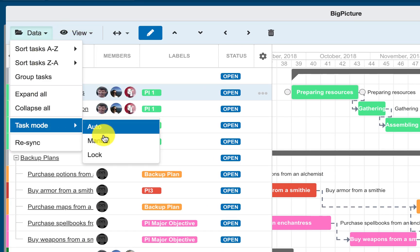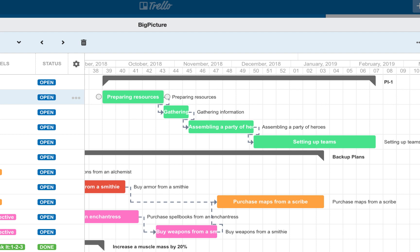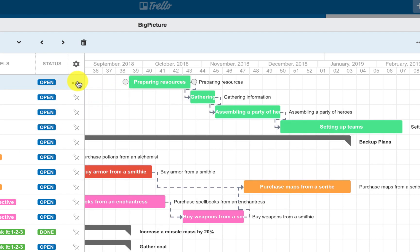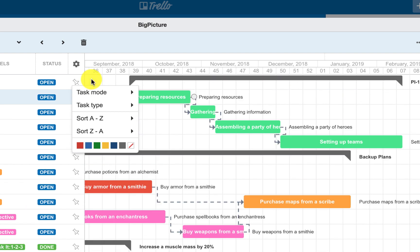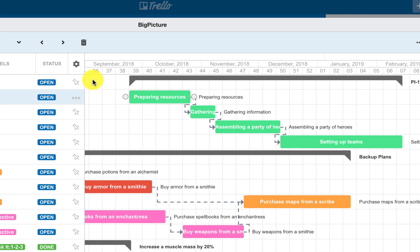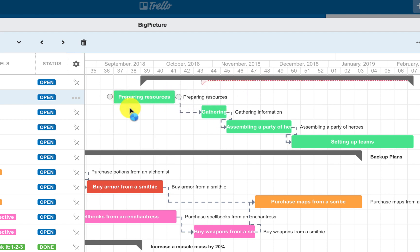When in the manual mode, all automation features are disabled, linked tasks and parent tasks will not be recalculated. The parent task actual position is still reflected with the gray bar, and the red dotted line indicates the position after recalculation.